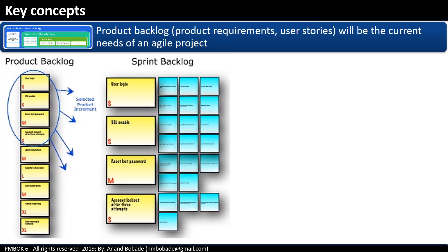In an agile lifecycle, product scope is documented in the form of a product backlog — a list of high-level requirements or characteristics of a product. The top-ranked items from the product backlog are selected for a sprint and added to the sprint backlog. During the sprint planning session, these requirements are further elaborated in the form of user stories. We'll talk about product backlog and sprint backlog in more detail in another session.